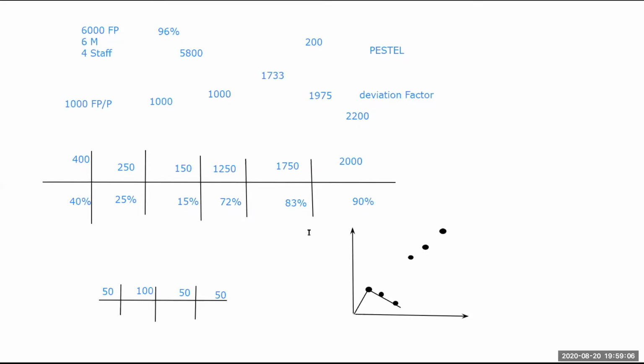Your target for each month was this one, which is the lesson to be learned: don't put your target the same every month. If we put it 1,000, 1,000, 1,000, in the end we will find out that we did not distribute the whole number and we did not reach the overall percent.